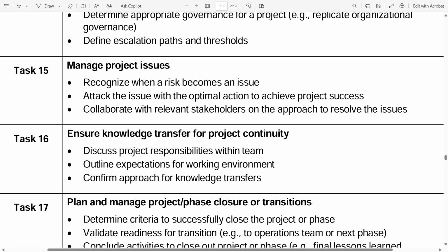Have I really defined a problem before I choose the option? The question said, you're a project manager and you're running late. What should you do? A, fast track. B, crash. C, do a lessons learned. And D, do a root cause analysis. Well, the answer will be do a root cause analysis, because it's presumptuous to choose crashing or fast tracking without doing the DIGSIV, right? Define, identify, generate, and choose.